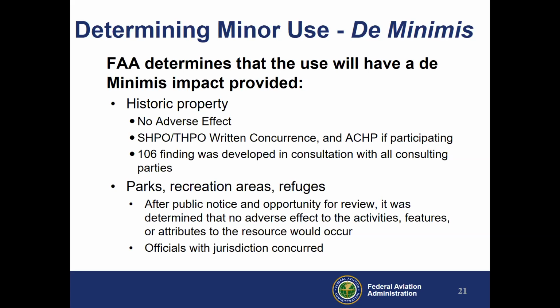The next one is the park, recreation areas and refuges. They require public notice and opportunity for review. And if it's determined that there's no adverse effect to the activities, features, or attributes to the resource, and that the officials with jurisdiction concur, then we have a de minimis use and no further documentation is warranted.